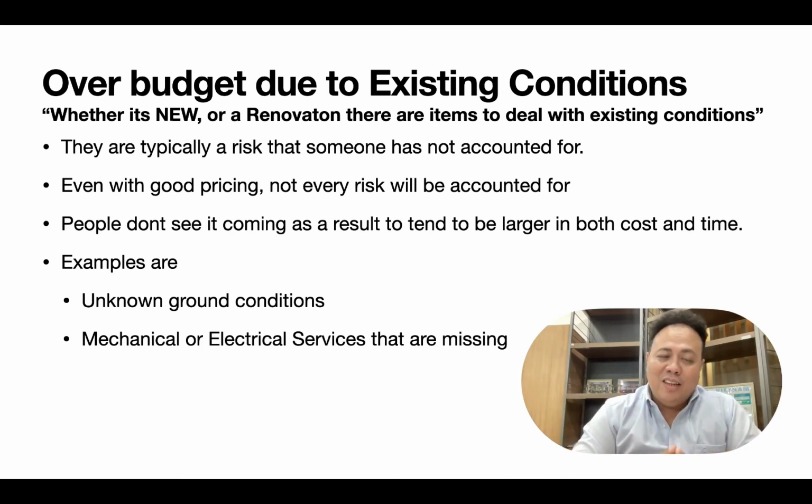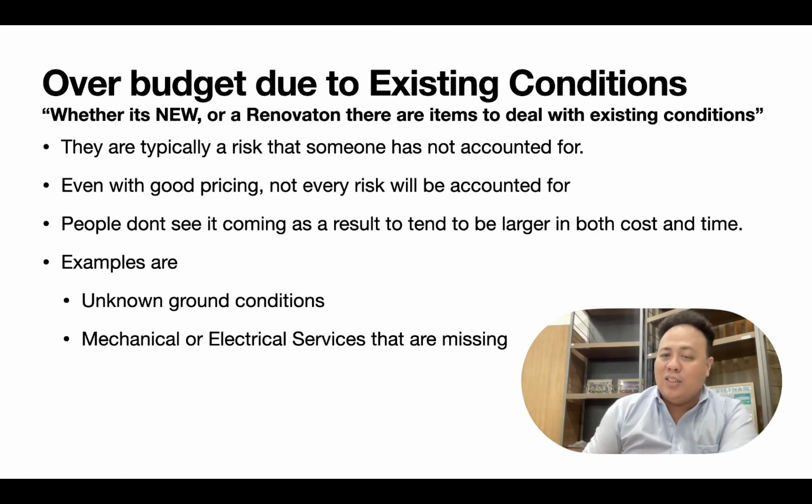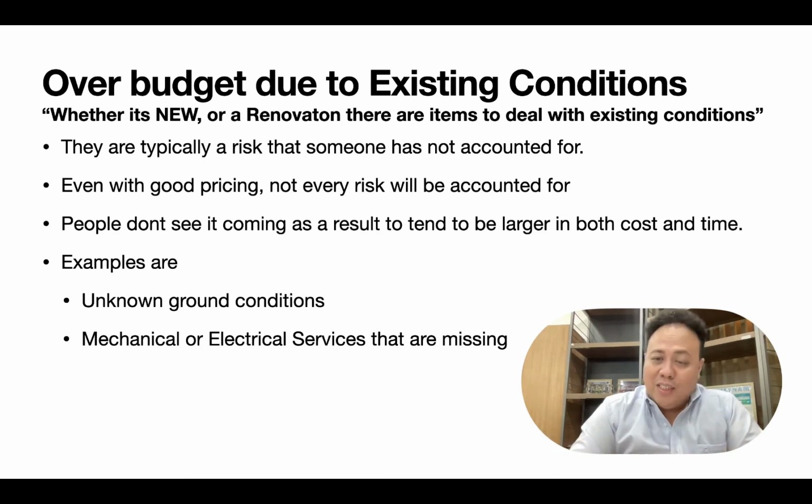Or let's say, for power: they say for your construction you need this amount, and you verify that the power is enough for the site. But when you check the actual power, it's less than what you were told. So at the end of the day, you have to pay and apply to the government for more electric capacity. And who will pay for that? The construction price will go up and up.